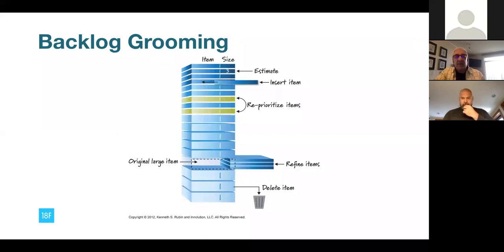There's only a few things that we do during backlog grooming. One is that we look at stories and we understand them. We then, as a team, including the product owner, of course, look at stories and tweak prioritizations. If we're a team that does estimation, we do our estimations during backlog grooming. We can split stories during backlog grooming, go from one to multiples. We might even do the most important thing there is for backlog grooming, which is delete stuff, take it right off the backlog. So it's all about grooming.